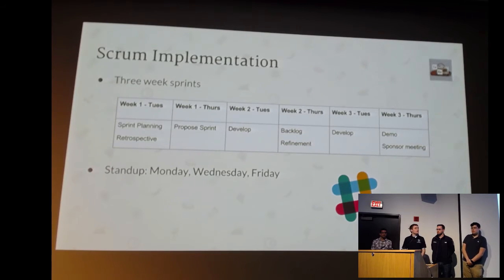In addition, we do stand-ups 3 days a week, Monday, Wednesday, and Friday. Friday is an in-person stand-up as a part of a team meeting, and Monday and Wednesday we do online using our team chat client, which is Slack.